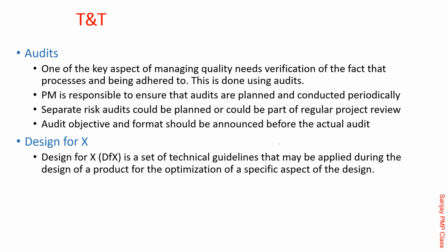Doing the audits is an essential part. In audit you might get a good amount of people-based questions, which means they might say that you are the auditor and this is what you have found. Now, remember some principles. Number one, the auditor's focus should be to look at the weak process, not the weak person. It is not about identifying an issue with the individual or a team. It is all about what process has gone wrong.